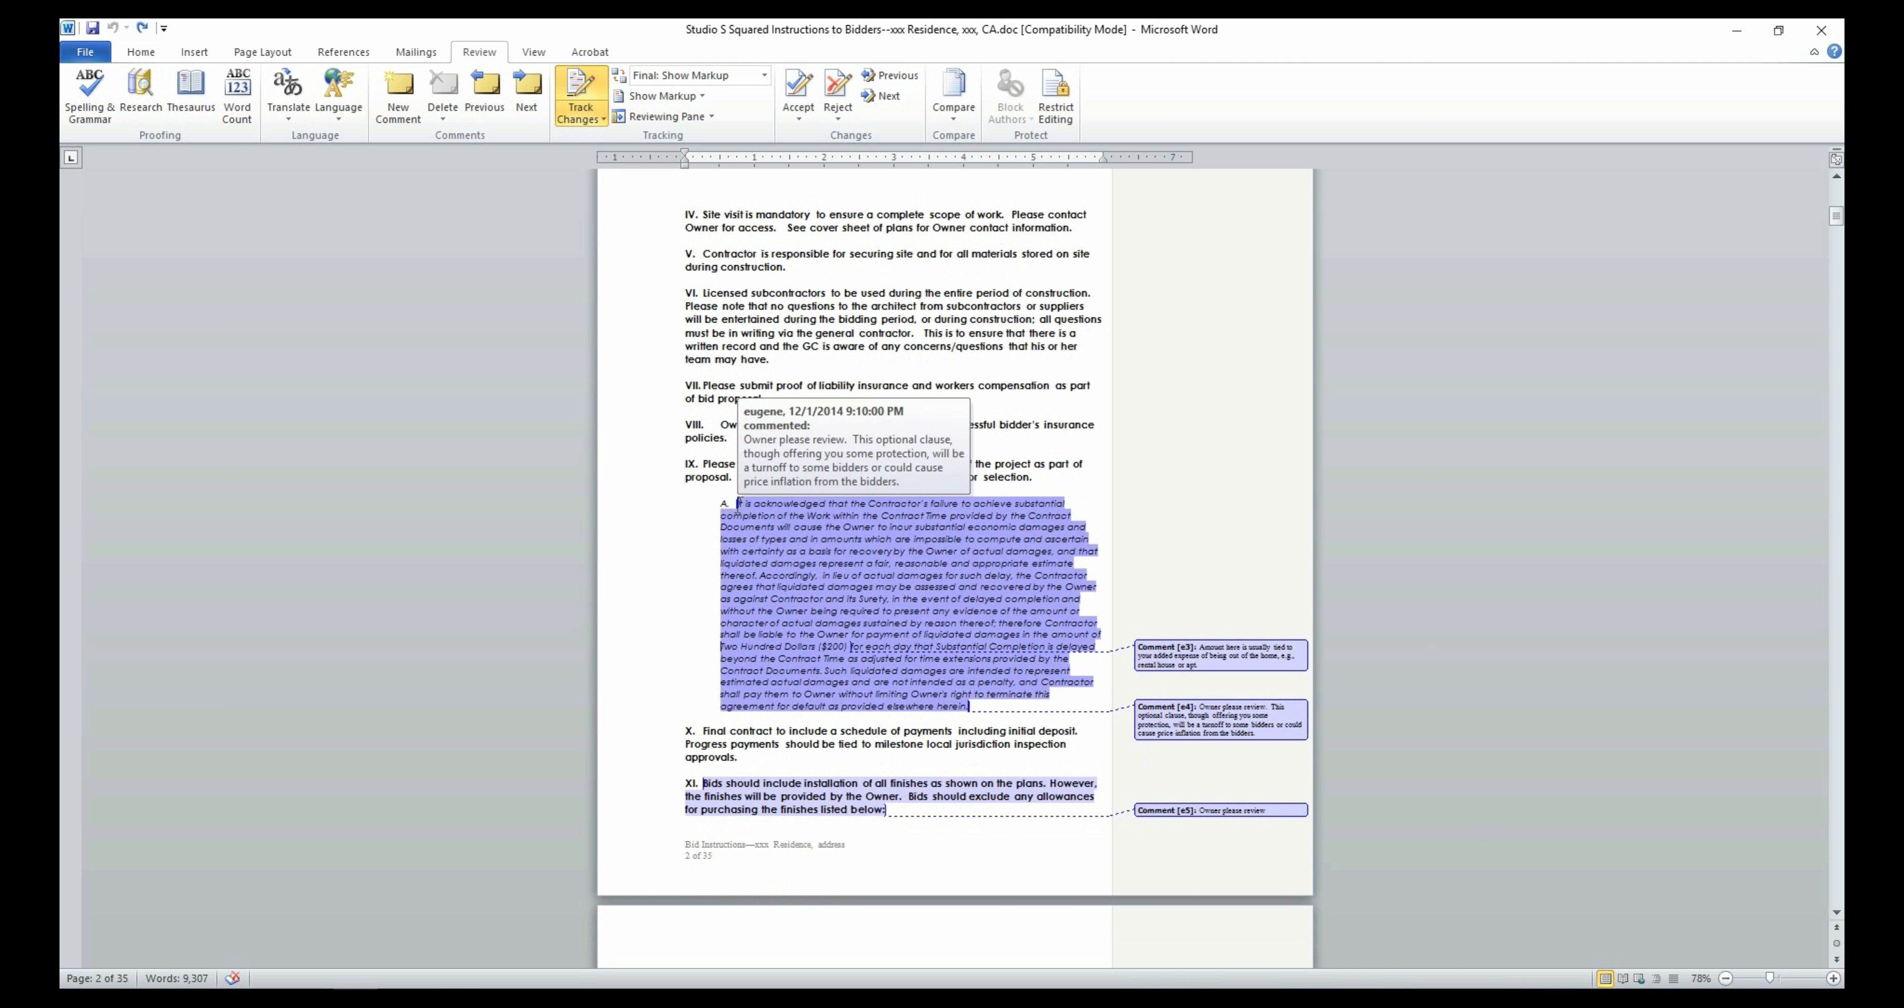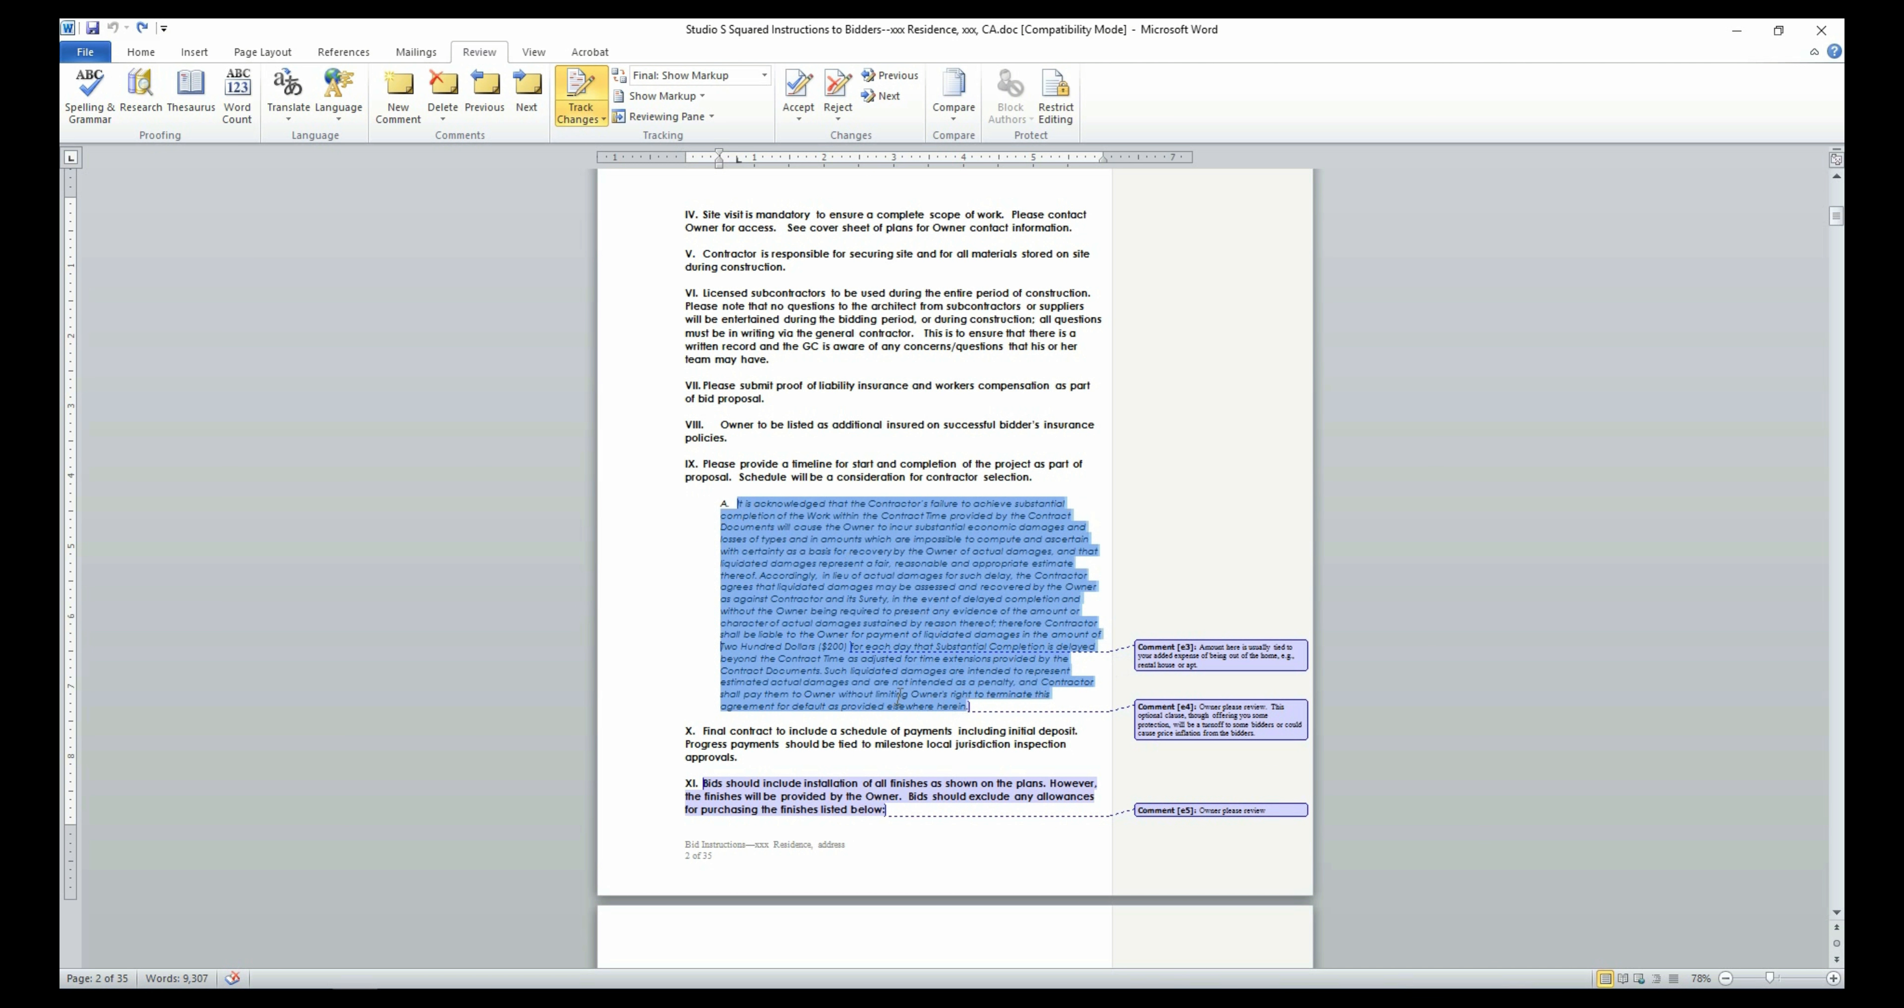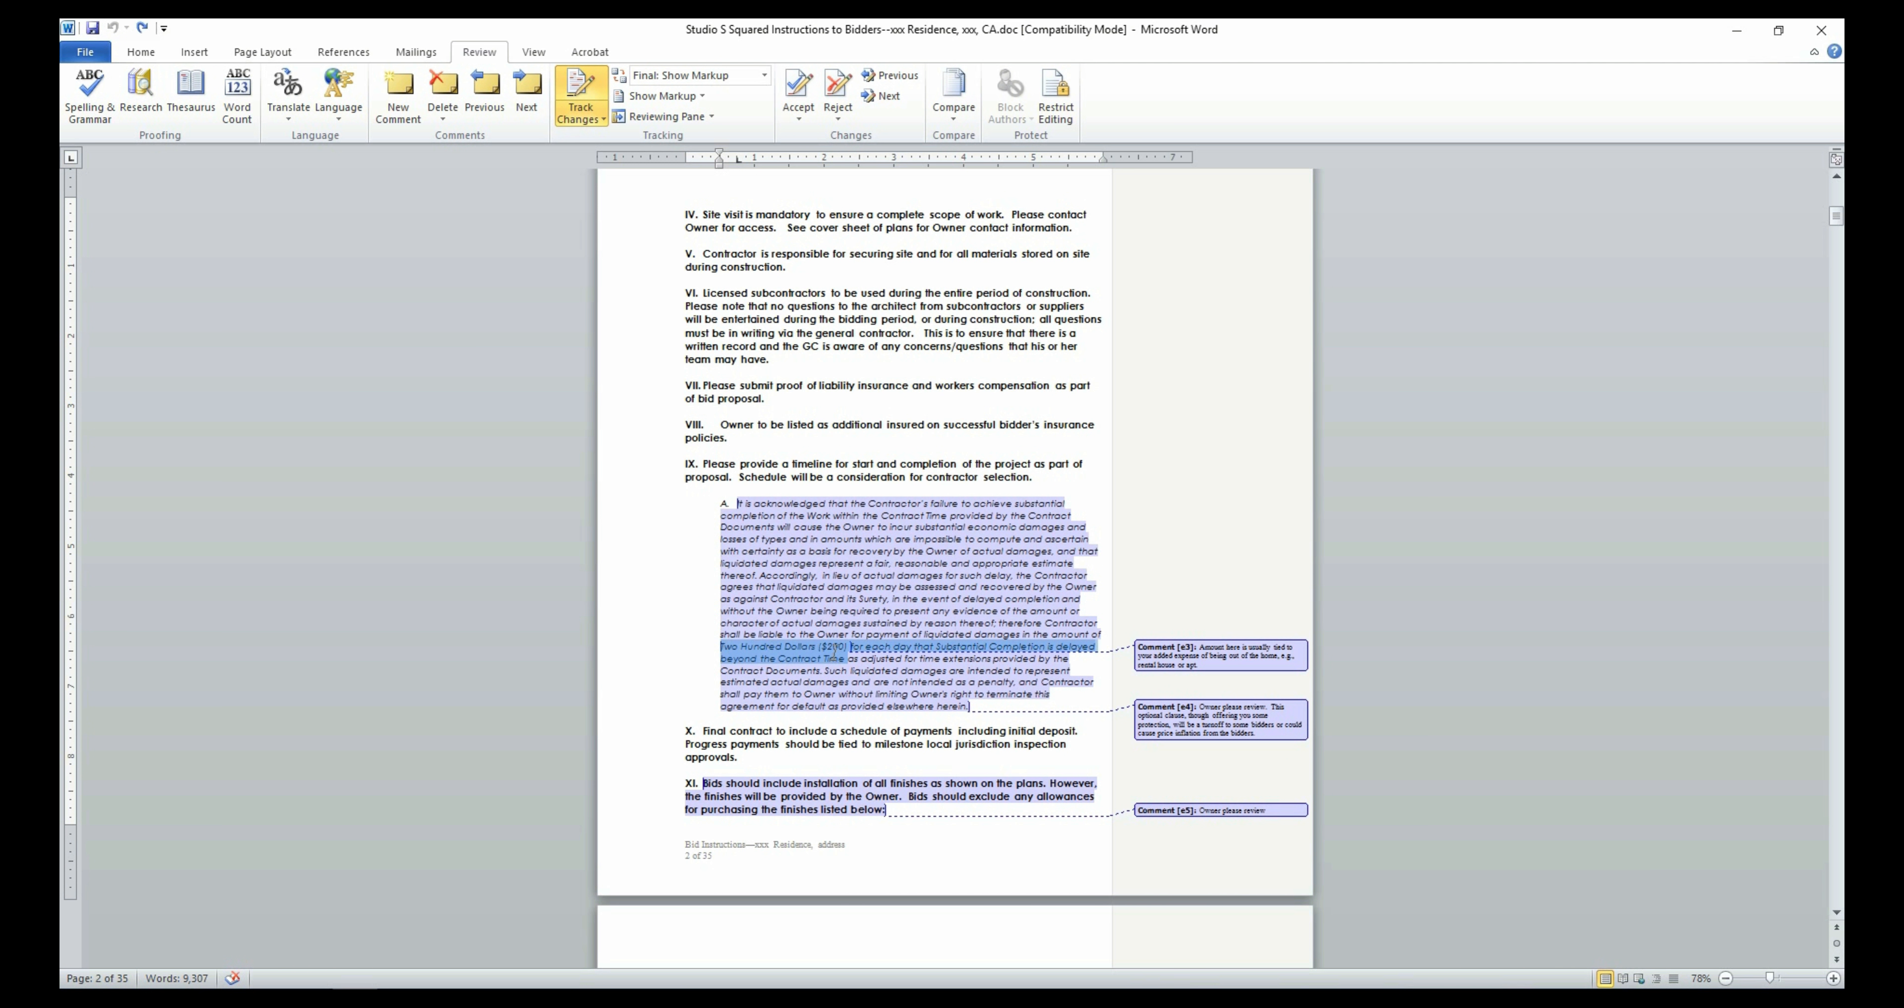Section 9 is one such part which will need your careful review and input. This section states that the general contractor will be charged with a fine of $200 per day if he or she exceeds the timeframe quoted for the project completion. You may retain this section if schedule is paramount to you.